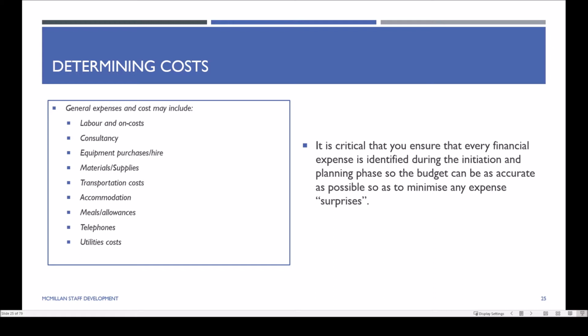Part of the contractual arrangements might also be things such as meal allowances, or payment of accommodation or transportation, be that transportation of materials and equipment, or transportation of people. It can also be other general expenses that are accumulated as part of the project, such as telecommunications, like telephone, mobile phone costs and charges, and utility power and so forth.